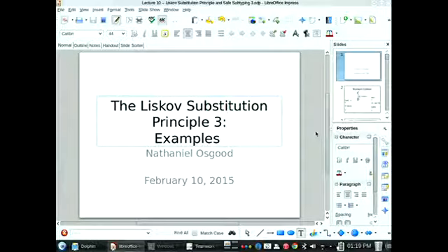But let's suppose that T2 depends on T1, but T sub 3 and T sub 4 don't depend directly on each other. How long could this take then? 13 hours. Good. So we have here task 1, and now we have task 2 that depends on task 1. And then we have task 3 and task 4 that each depend on task 2. And once we're done with completing all the tasks, I'll draw a transition here to the finish, right?